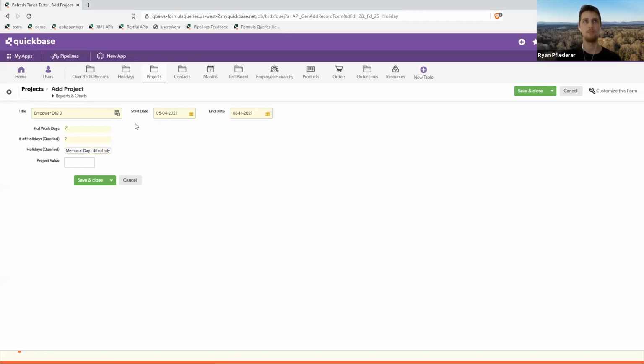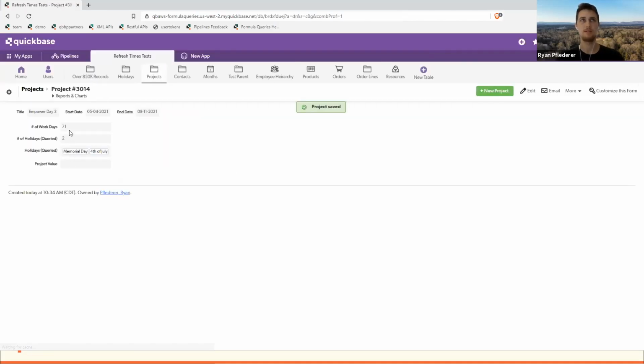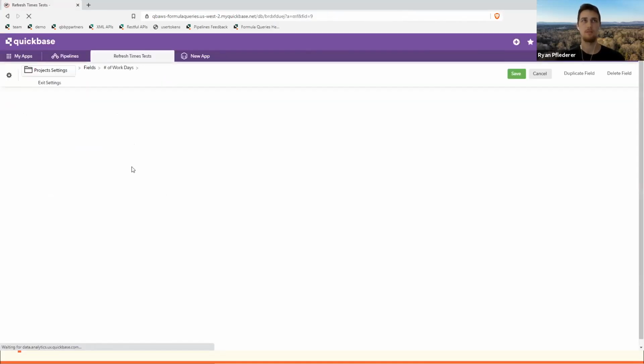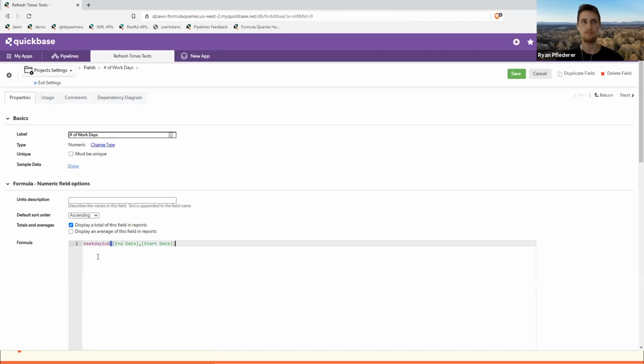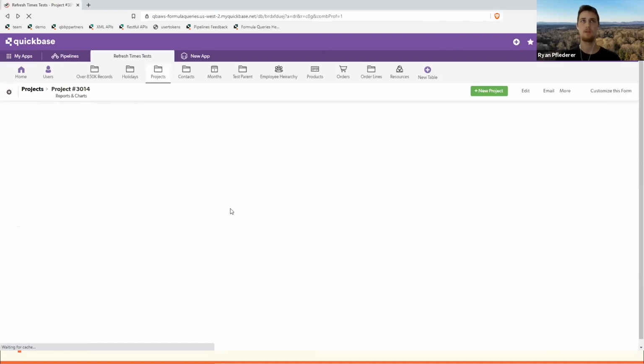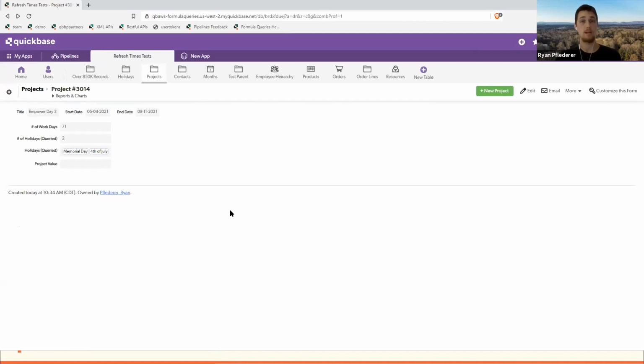Okay, so I've got a field here, number of work days. This number of work days is just a standard formula field that's taking the end date minus the start date. I think it's using weekday sub. You know what? Let's go ahead and save this, and we can jump into this field. So yep, we're using weekday sub, end date with start date. So at that point, we are not accounting for any holidays that fall within that range.